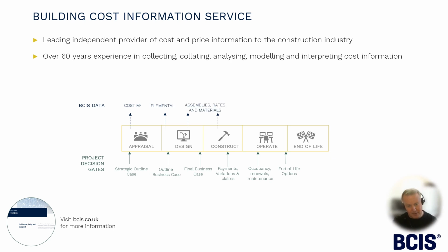And unsurprisingly, I hope, during that more detailed design, the rich detailed information is available on BCIS. We'll go all the way down to material quantities and costs for particular activities, productivity rates, so how long it takes to build, for example, something like a metre squared of brick wall, the common example that a quantity surveyor like myself would use.